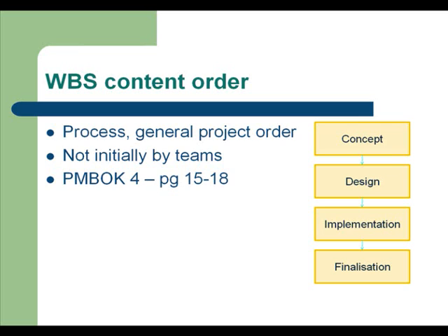What some people do is they sit down with a particular team, say for example engineering, and they will write all the tasks that engineering need to undertake to finish the project. This helps clarify what needs to be done, but it makes it more difficult to see the logical sequence and order.